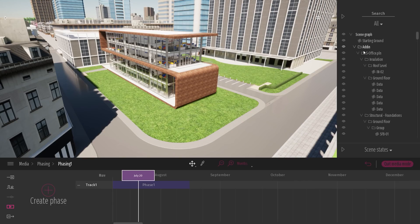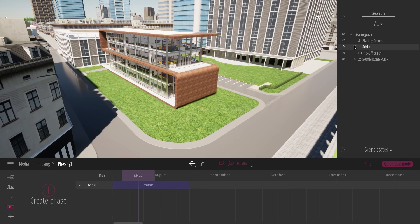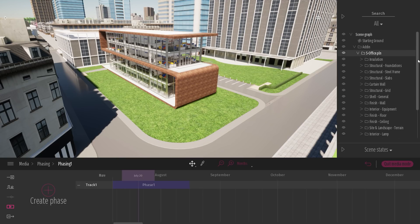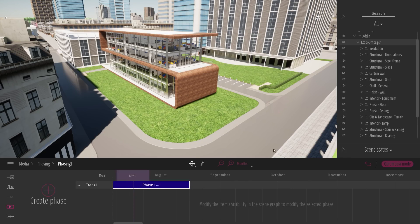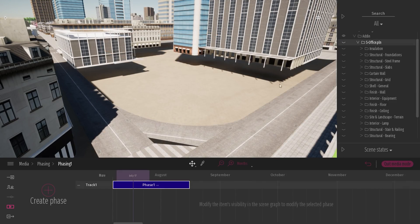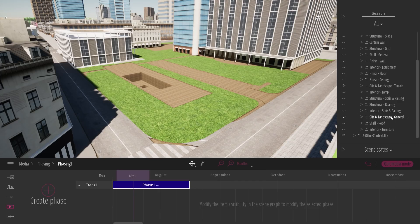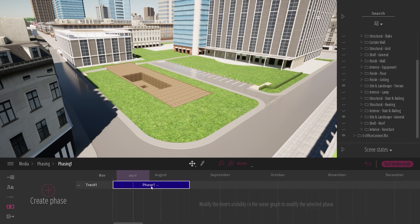I'll come to my scene graph, right-click on my add-in and collapse the hierarchy so all folders are collapsed and I have a better view of all my different layers coming from ARCHICAD — structural foundation, steel frame, slab. In my first phase, I want just the hole in the ground, the start of the building process. I'll select phase one, hide everything. The phase is automatically updated with the hidden state of all objects. Then I'll unhide the site and landscape terrain and the site and landscape general, which is the road. This is my first phase, automatically updated as I click the eye icon.